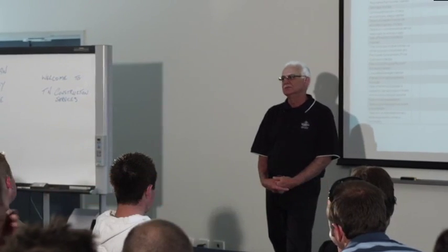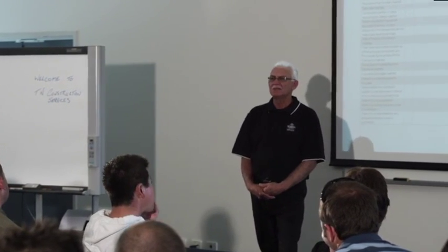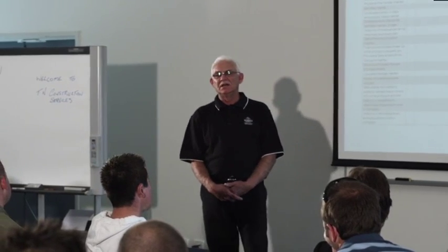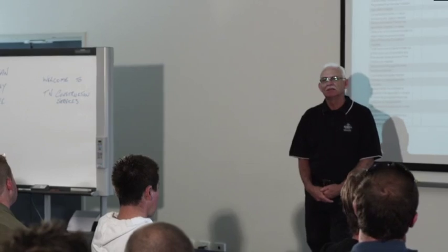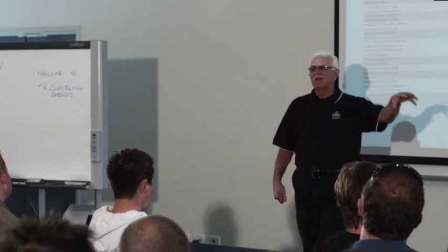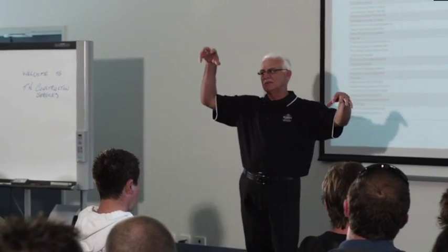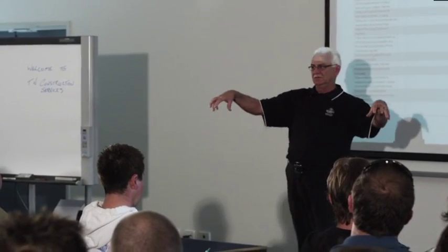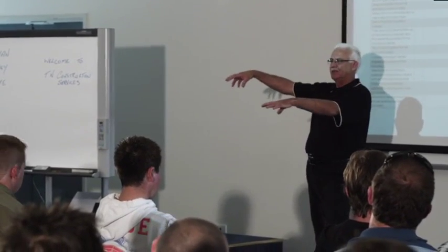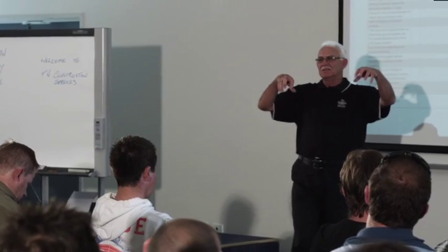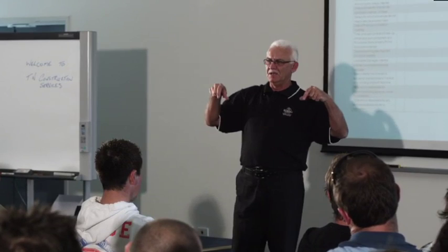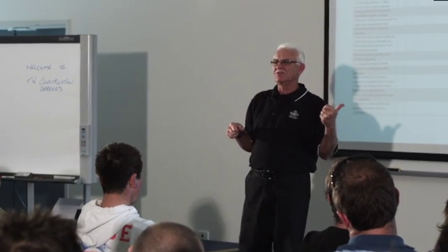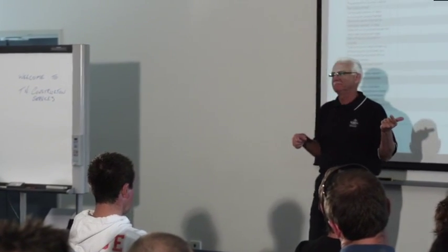The answer is no. The BSYPA Act is purely for builder and subcontractor, and not only is it the Building Industry Construction Payments Act, but there is also the Subcontractors Charges Act that goes with it. Right, so two totally different things. The only things that are legally responsible between the builder and the owner are the Domestic Building Contracts Act and the QBSA Act.